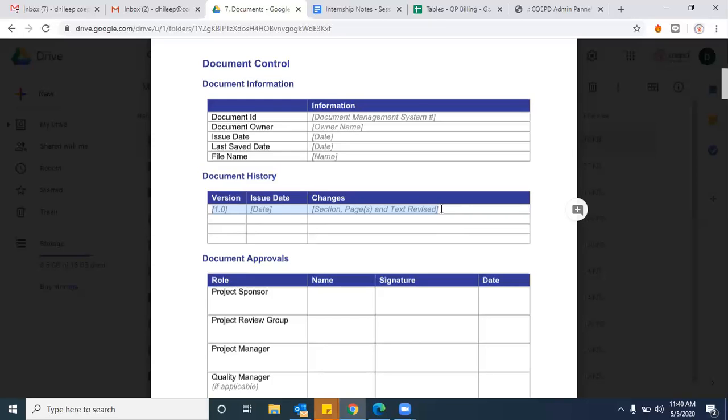Okay, if they are suggesting some improvement areas or add-on features to the existing features from the project manager or from the client end, then you should come up with the next version of the document. Like the same version 1, 1.1 or 1.2 or 1.3, or V1, D1. We have different version controls. Couple of people are keeping 1.1, 1.2, 1.3 like that. Couple of people, even in our company, we are following version 1, D1, version 1, D2, version 1, D3.